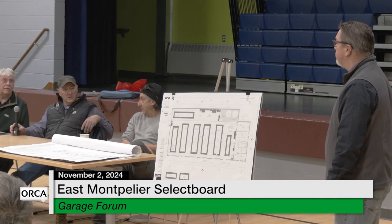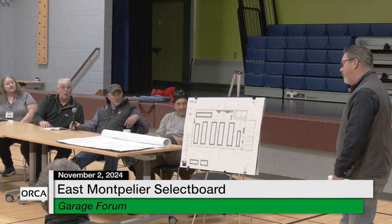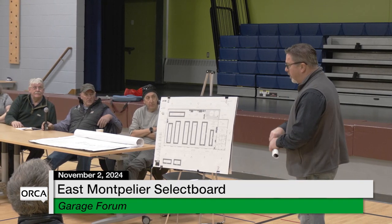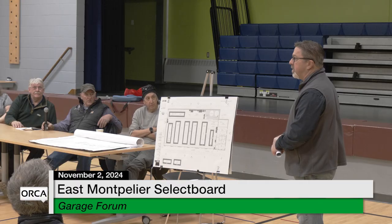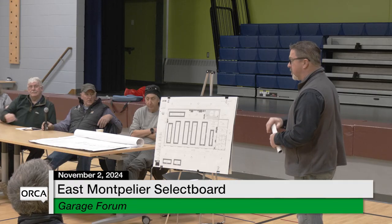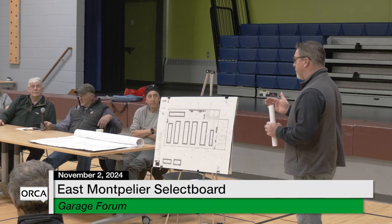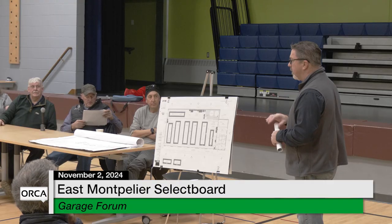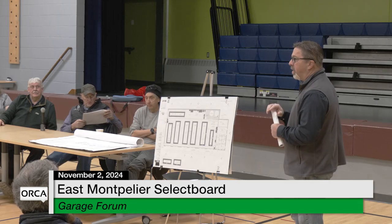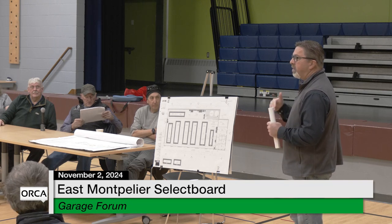Dave, could you speak about the cost of just delaying it a year or two? Or five. Well, 5 years is a lot. So I was speaking earlier, just rough order of magnitude, we've seen prices of construction double between 2017 and now. And it's been an extraordinary time of escalation. Over the last couple of years, 2022 and 23, we saw escalation in the 6.5% range across the board on a lot of building materials and such. We're now planning on about 2.5% to delay things for a year.